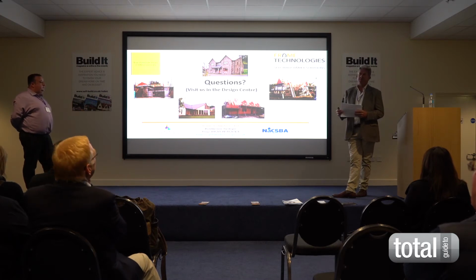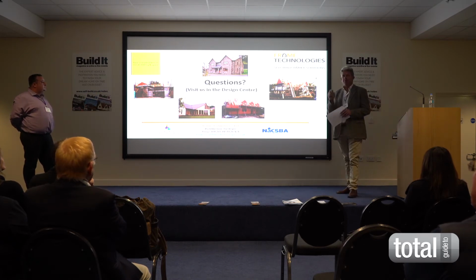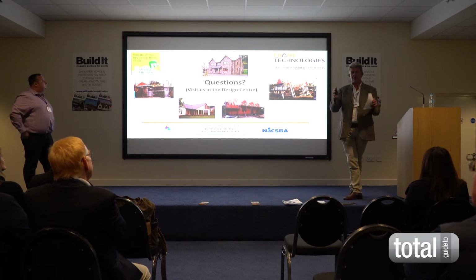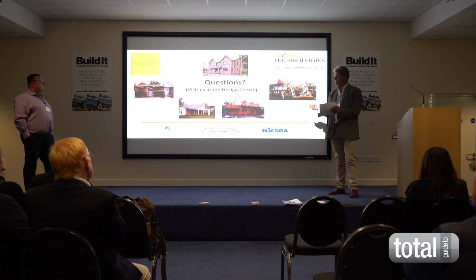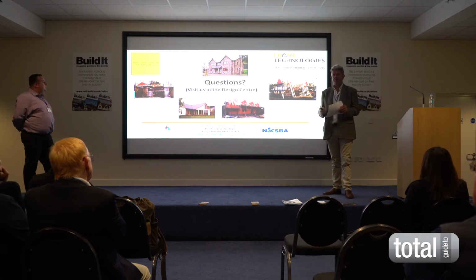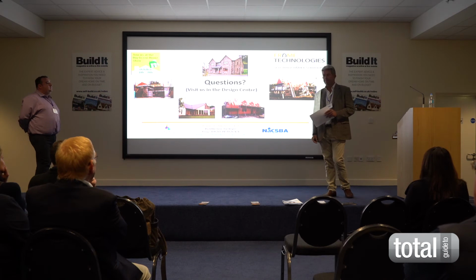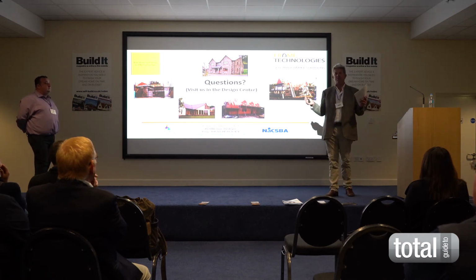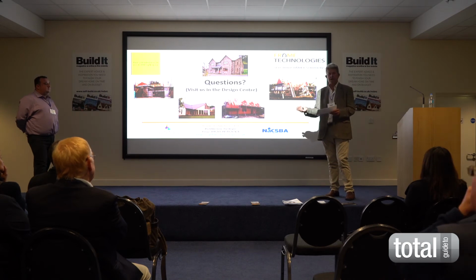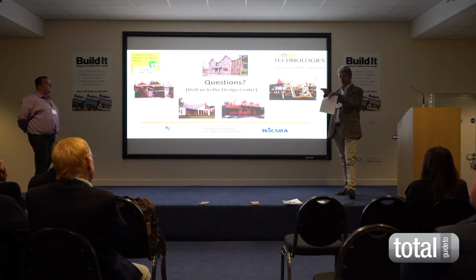It actually gives you a lot more comfort, but also one of the key things I would say to take away from me today, and Martin would agree with this. You go out to the market, you decide the build system you want, whether it be ICF, whether it be timber frame, whether it be thin joint, hopefully it'll be timber frame, hopefully it'll be ours, but make sure you're looking at apples for apples. It's so easy these days to have the drawings all done, it's all electronic, you put 20 names into the send field and press send, and you get 20 different responses back and you just cannot decipher one from the other. The times people come back to me and say, I've got this quote, your quote's too expensive, or your quote says this, their quote says that. And even I struggle, as somebody in the industry, to read quotations and read specifications, struggle to actually balance apples for apples.